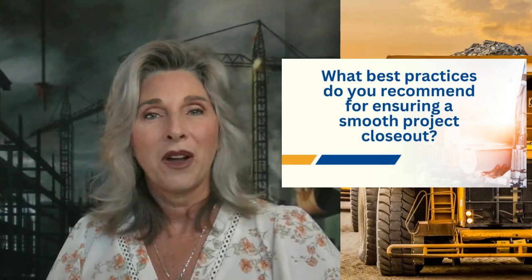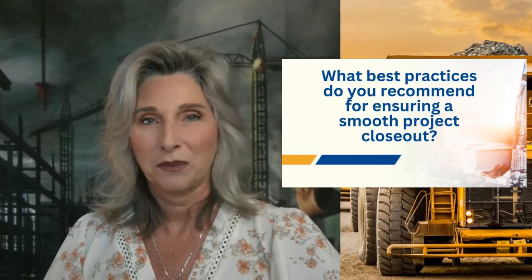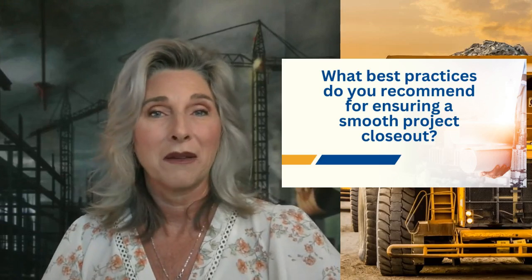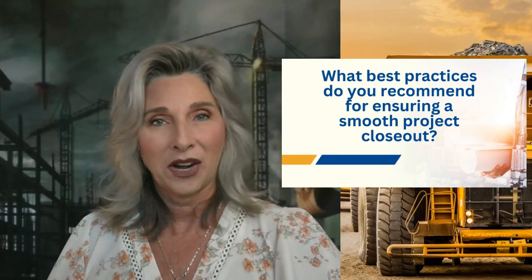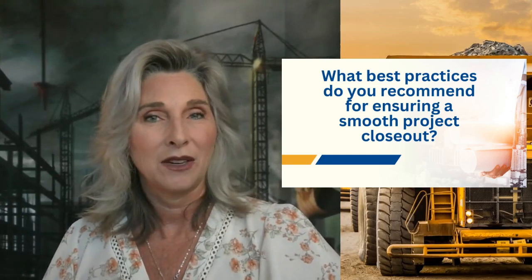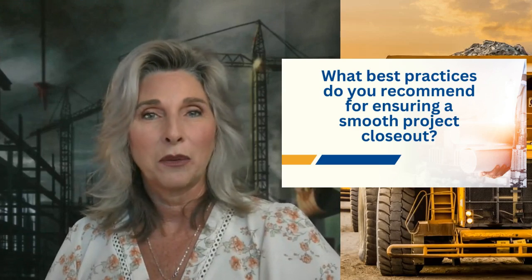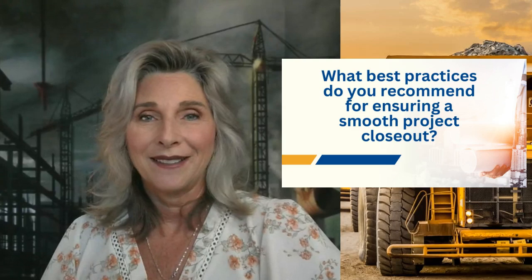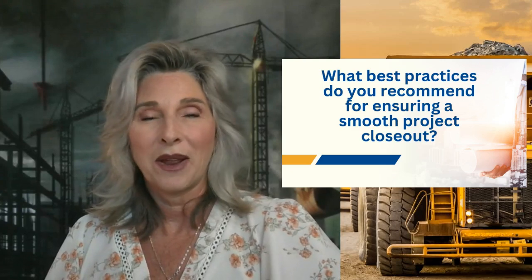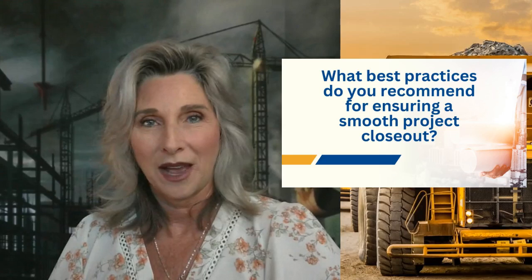We're also going to want to identify things that may really impact this project that aren't going to be complete, that we want to have a dollar or monetary value associated with those items so that we can add some incentive to the project to really have the contractor appreciate how important it is for us that we have this also included in the project closeout.